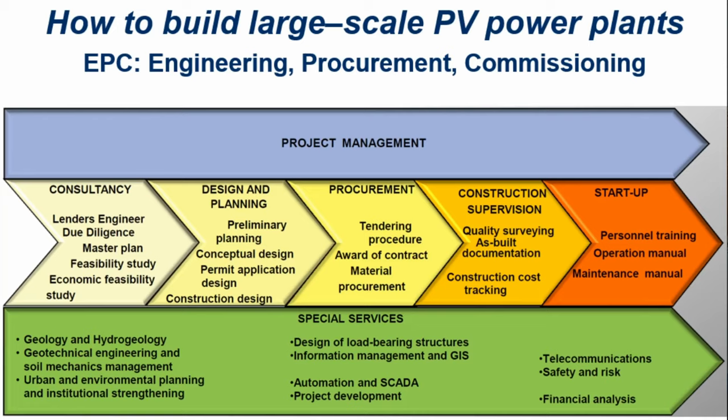First it starts with a preliminary planning, then a conceptual design, then the permit application — because sometimes you have to get permits from the utilities, because you want to achieve a power purchase agreement, called PPA — and then the construction design.